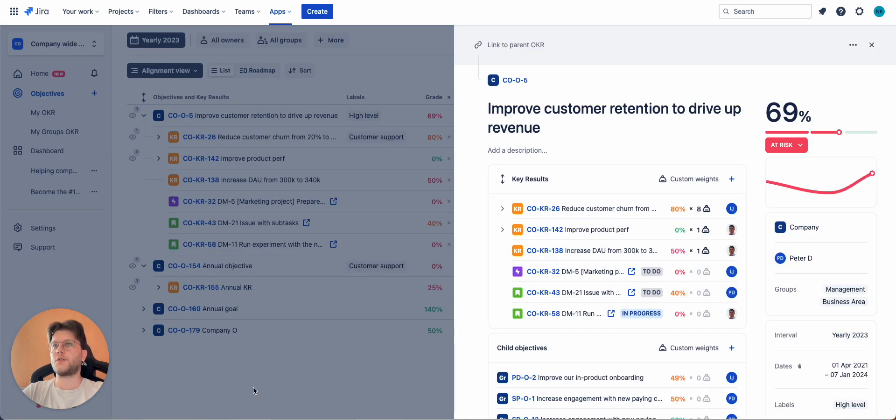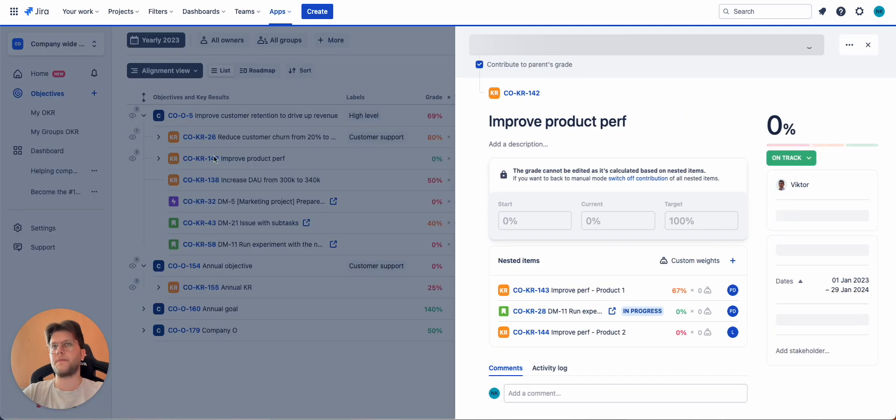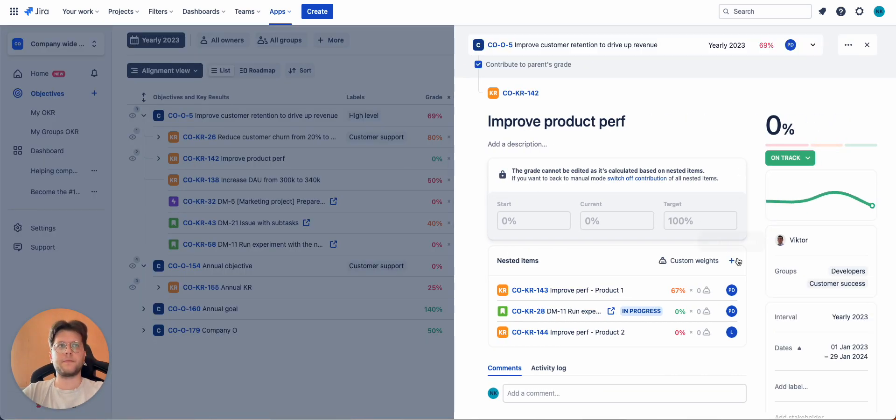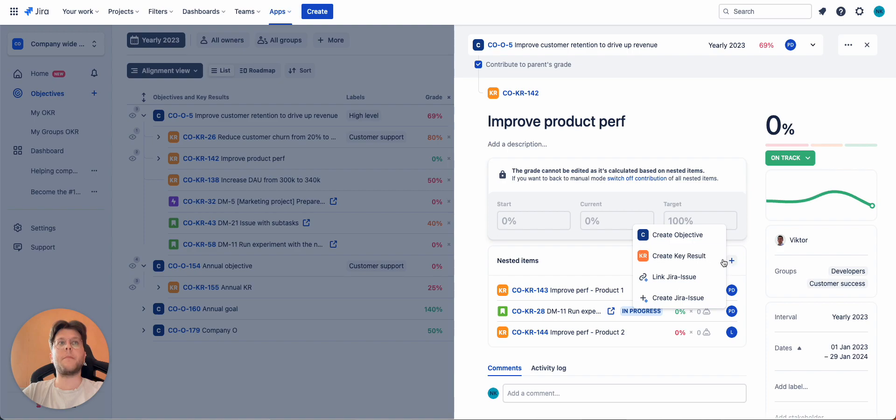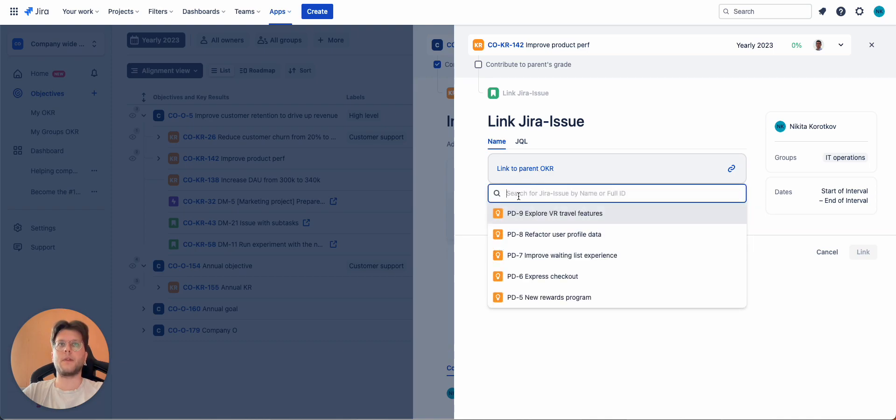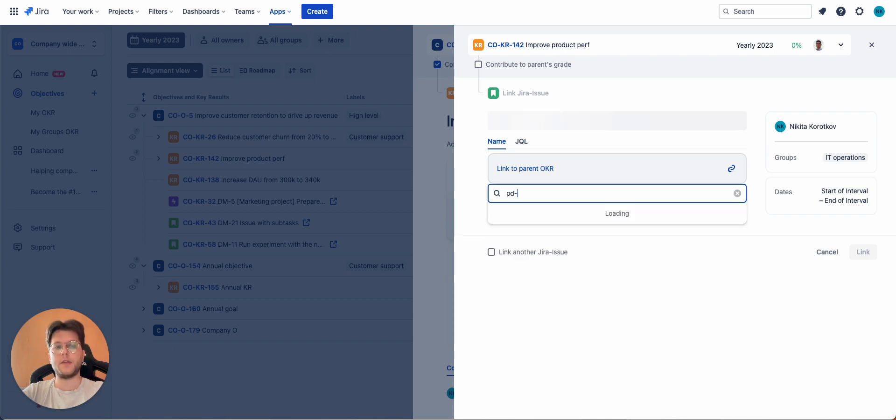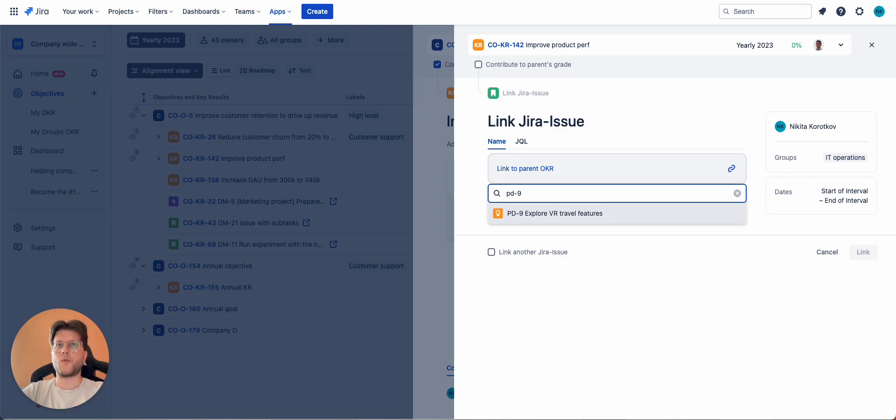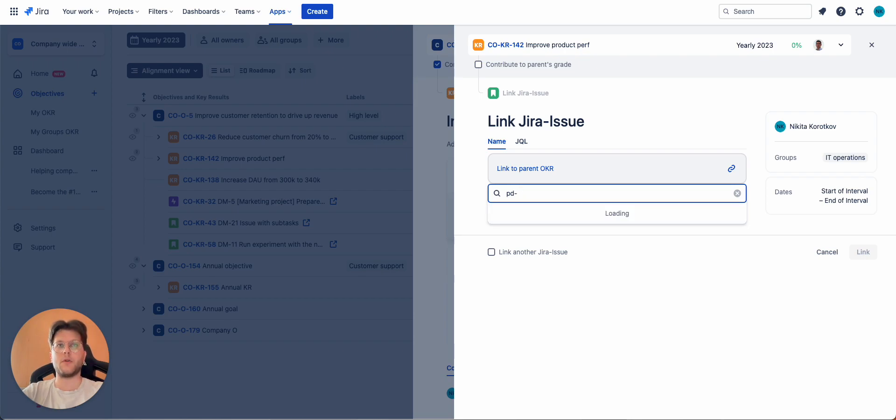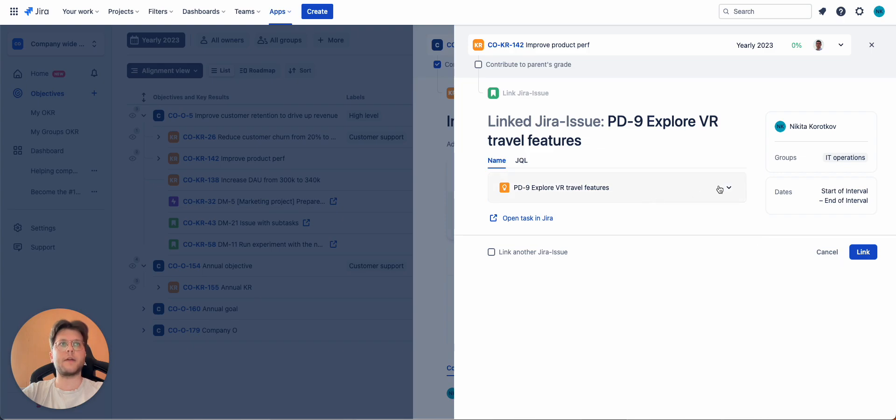Regarding the Jira issues, there are two ways of how you can actually link them. You can link them by name or using Jira issue ID. For example, PD9. And here it is. Or we can use a part or the whole title of this issue. For example, this one has Explorer in its name. Let's type it in. Explorer. Yeah, there you go. Found it. Once you're ready, you select it and click link.